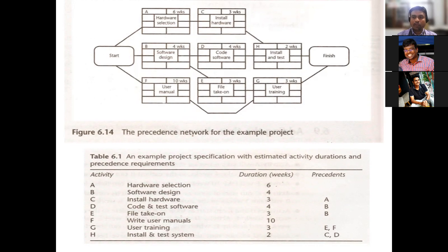It's not only about activity constraints. Sometimes resource constraints will also be there. Here they are mainly targeting activity constraints, but there are projects with resource constraints. Some resource may be very important but busy with other work. So meanwhile they do other work, and once the resource is free, this work is allotted to that resource. These are all the constraints they put in at the scheduling itself.